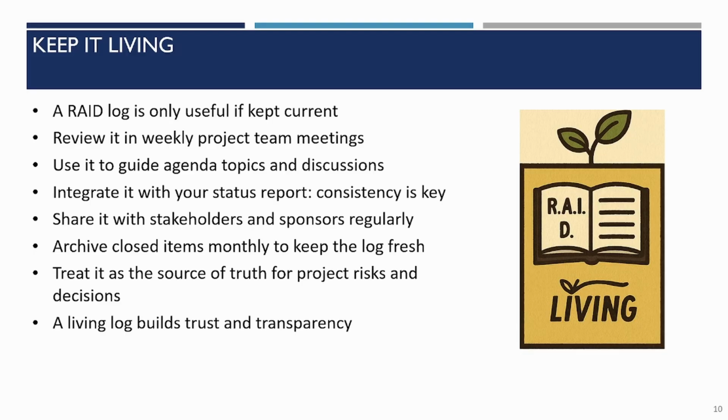Integrating it with the status report, right? Because the status should be including key risks and key issues and upcoming decisions, and sharing it with stakeholders. Archiving closed items, so you want to keep it clean. You don't want it to be a running log of sort of garbage. So you want to archive or close or filter out those things that are no longer relevant. And it's got to be the source of truth in one place. And again, it doesn't matter what the tool is, so long as you have a single place that it's in